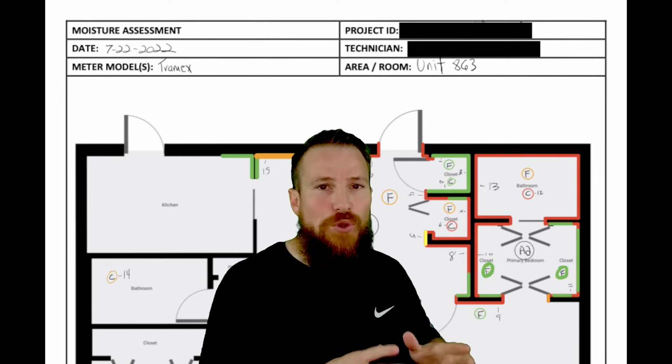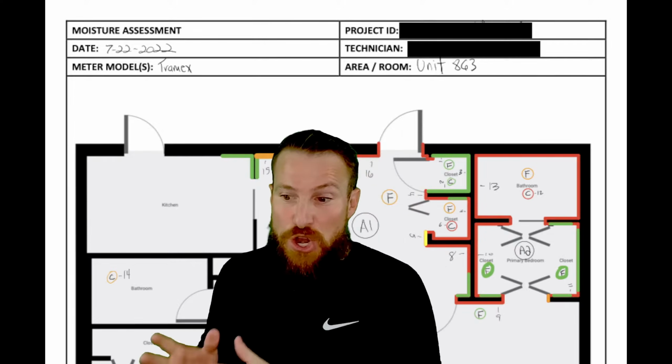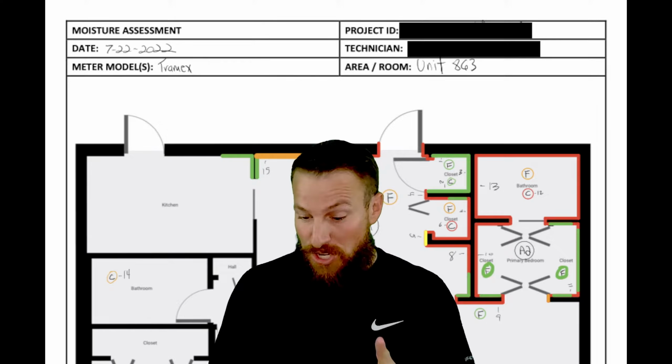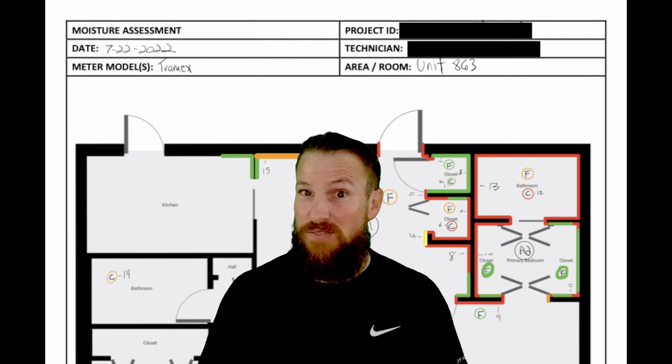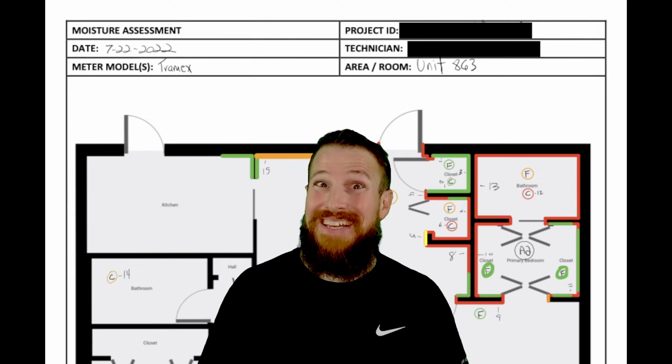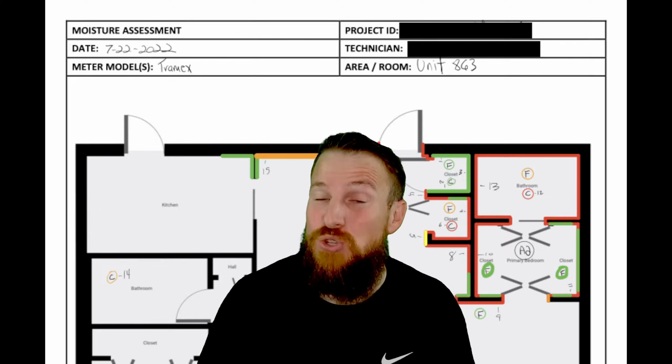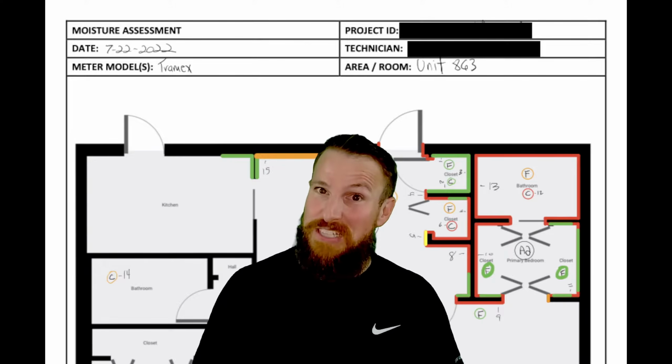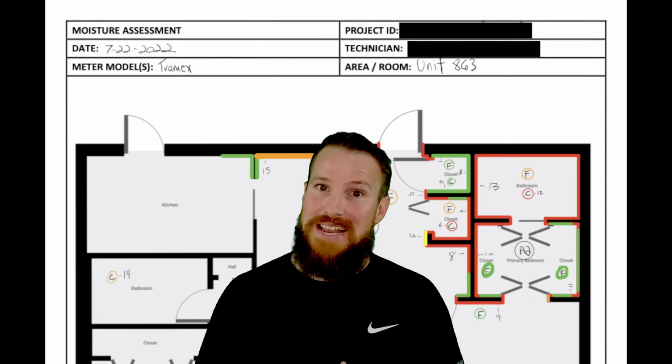In order to know if you are actually drying, you need to know what your environmental conditions are. You need to know what your moisture concentration levels are. These are things that we monitor daily. These are things that the insurance adjuster is going to want you to provide at the end if you want to get paid. So do your due diligence and make sure that you've got some level of competent documentation.